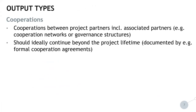Let us start with corporations. Corporations between project partners, including associated partners, are considered here within the output type of corporations. They can, in the frame of a project, be further formalized, like in the frame of cooperation networks, or the project could lead to the setting up of respective governance structures. Ideally, these corporations established in the frame of the project should be continuing beyond the project lifetime. In order to have this reflected in the indicator system, this needs to be documented in formal cooperation agreements, as will be shown later when we come to the part on indicators.